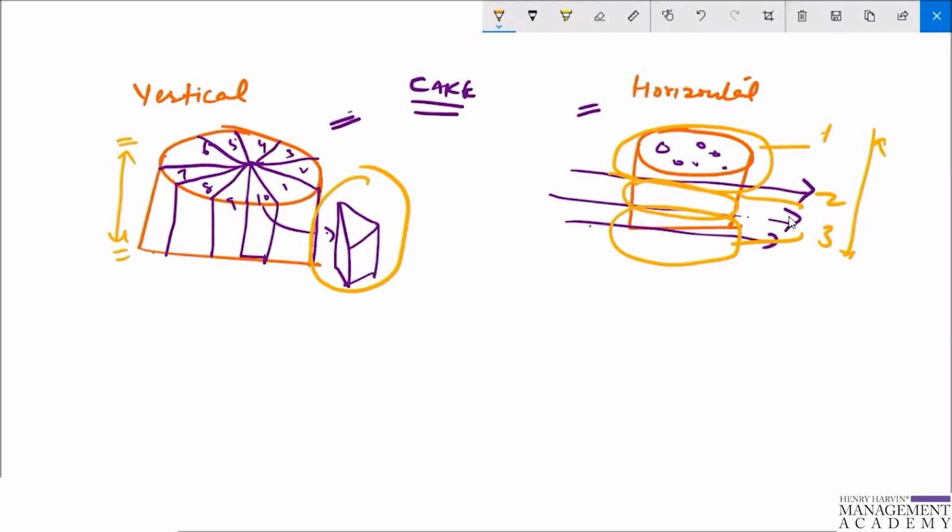Another problem is that it increases the bottleneck, because instead of reducing the bottleneck, horizontal slicing increases it. Why? Because horizontal breakdown is often accomplished by silo thinking. So every member is taken from one of the silos required for software development. The design guy will take care of the design, the database guy will take care of the database setup, the developer writes the code, and the tester does the testing.